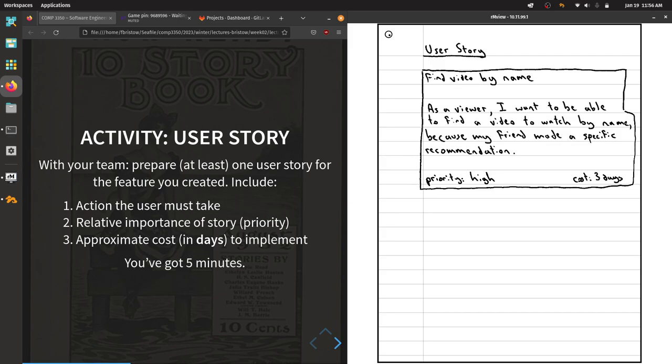Alright, the one piece of feedback I really commonly give about user stories is that they're too big. A good indicator that you've got too many things in your user story is the word 'and' — when you have 'and' in there, that usually means it's actually two user stories. For example, if I want to find videos by name and by category, that's two separate user stories: find by name, and separately, find by category. That's a common thing I see across all iterations of this course.